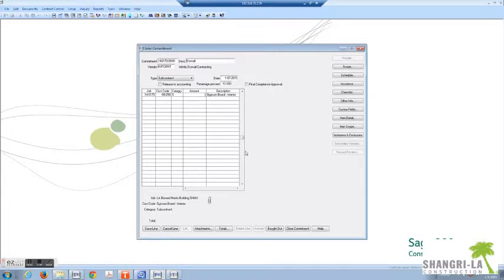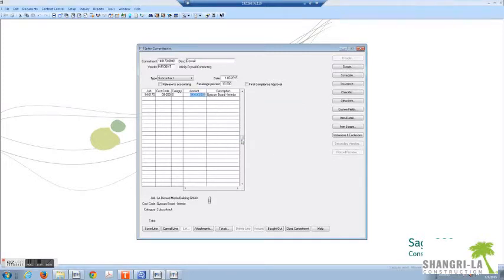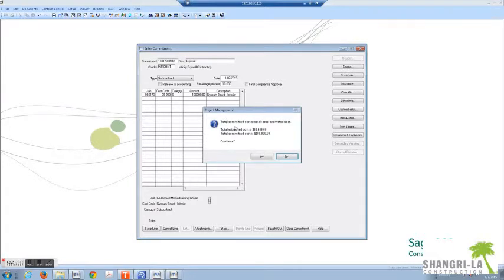And then enter the amount. So I'm going to enter $100,000. And in this instance, we see that a cost estimate has been entered, which is good. And my commitment that I'm about to enter is over the estimate. This is a good warning sign, and it lets you know that, hey, are you sure you entered the right amount? In this instance, let's say we did.